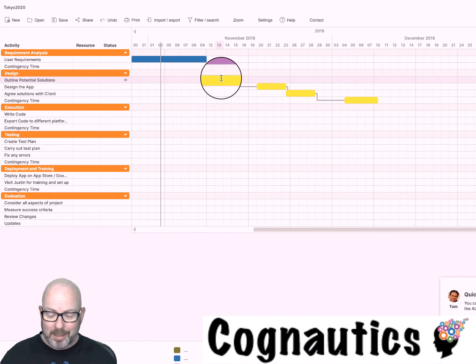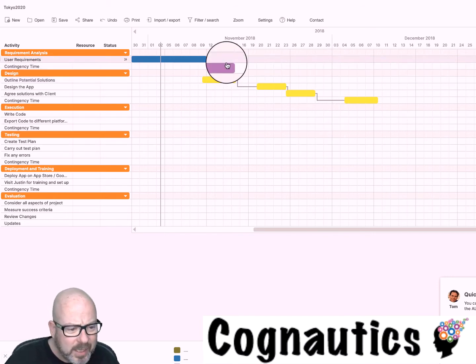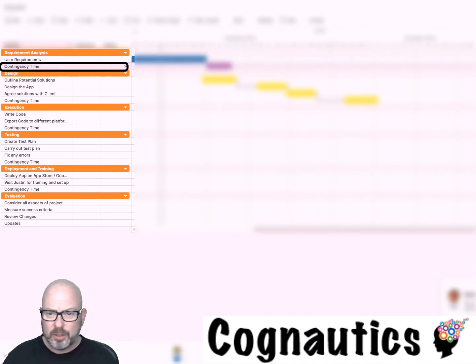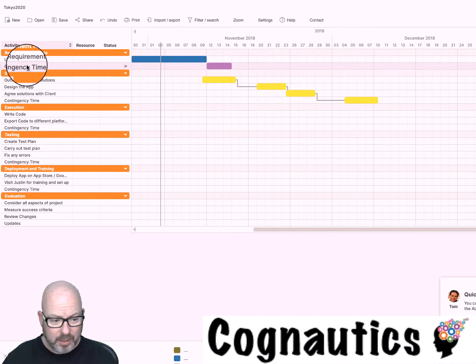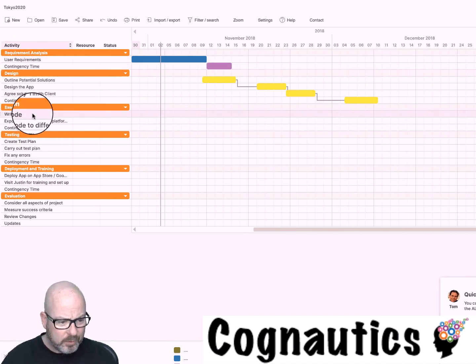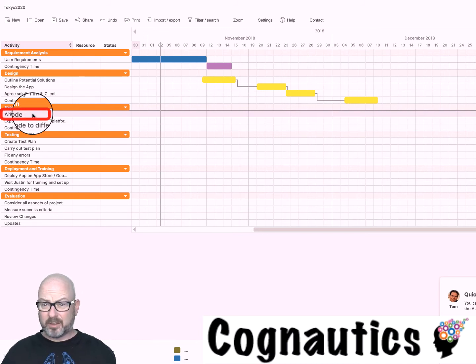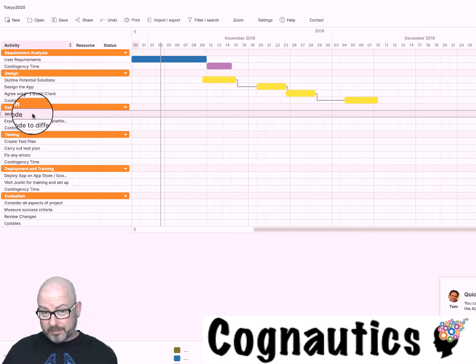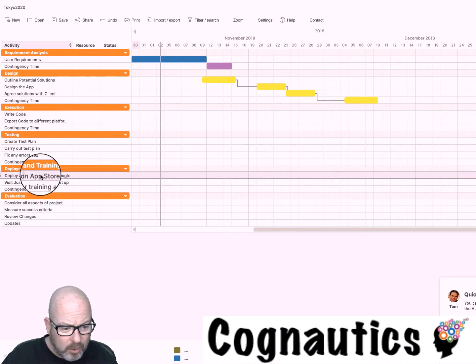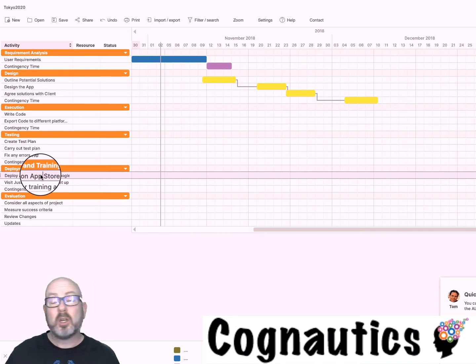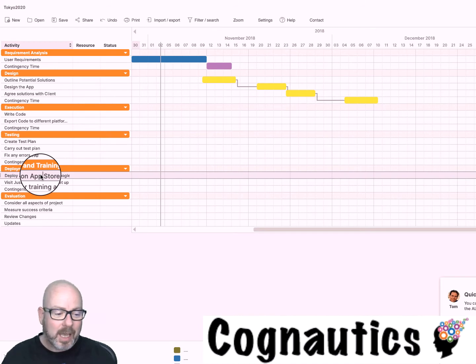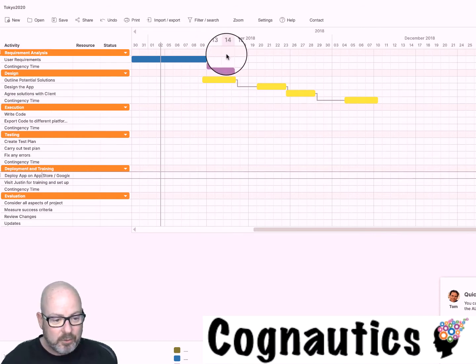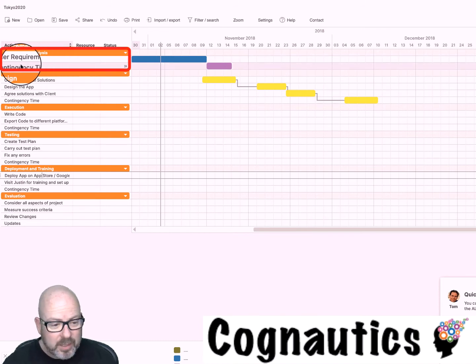The other thing I need to explain to you here is contingency time. Can you see I've got it over here? Contingency time: you're building in time headroom for things to go wrong. Say for example you give it to the coder to write the code and the coder says we agreed four days but it's going to take me a fortnight to do this. Or you try and deploy it on the app store and actually the app store's gone down for a week. Something can happen at any of these stages that will make you go slightly out of sync, to be late with things.